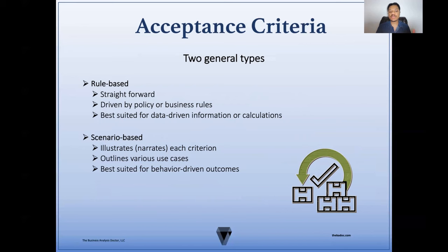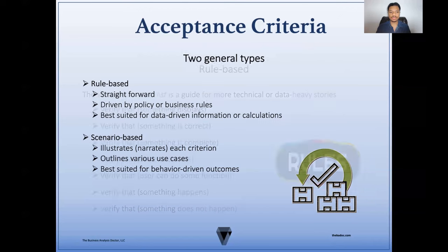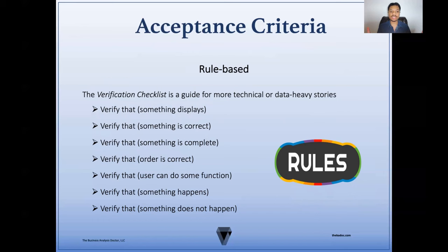Rule-based acceptance criteria are much more straightforward. They're driven by policy or business rules, and they're best suited for data-driven information or calculations. Scenario-based acceptance criteria usually illustrates or narrates each criterion and outlines various use cases. It's typically best suited for behavior-driven outcomes. For the rule-based verification checklist, this is a guide for the more technical or data-heavy stories — usually verifying that something displays, that something is correct, that something is complete, that the order is correct, verifying that a user can do some function, or that something happens or does not happen.